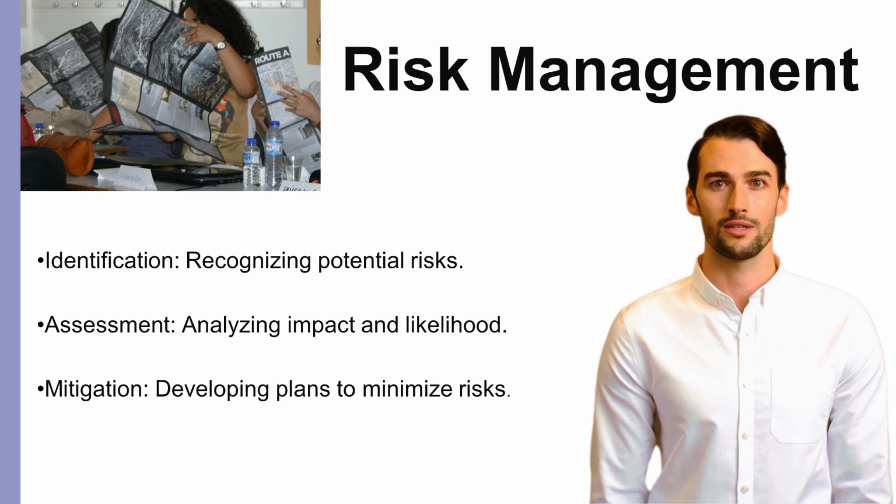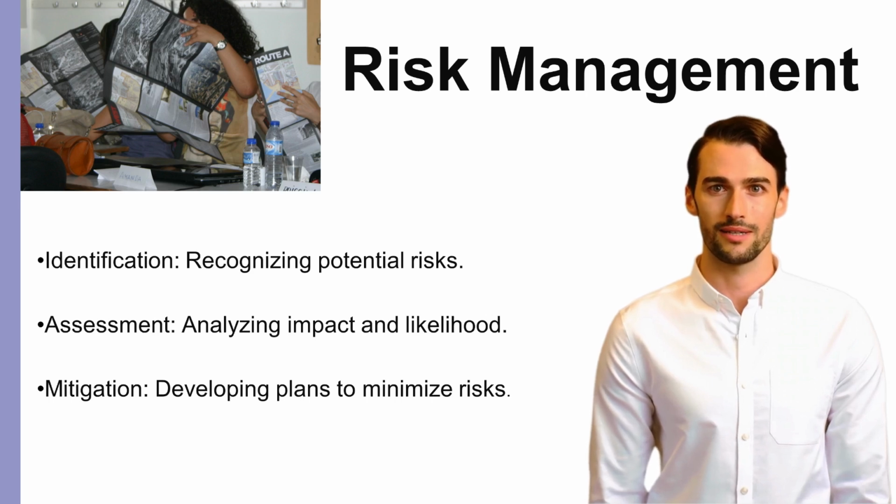Risk management in projects involves identifying, assessing, prioritizing, and mitigating risks that could impact objectives. Key aspects include risk identification, identify potential risks that could affect the project, considering internal and external factors that may lead to delays, cost overruns, quality issues, or other negative impacts. Risk assessment, identify and assess risks by their likelihood and impact using qualitative and quantitative methods to prioritize them.